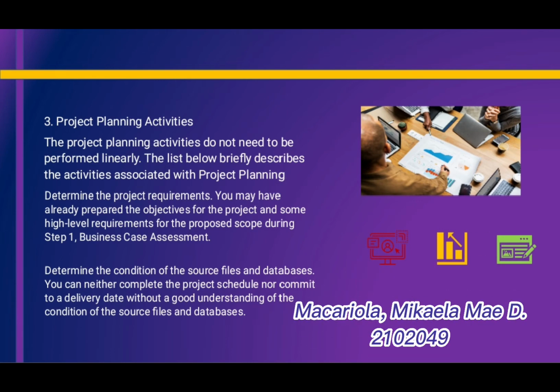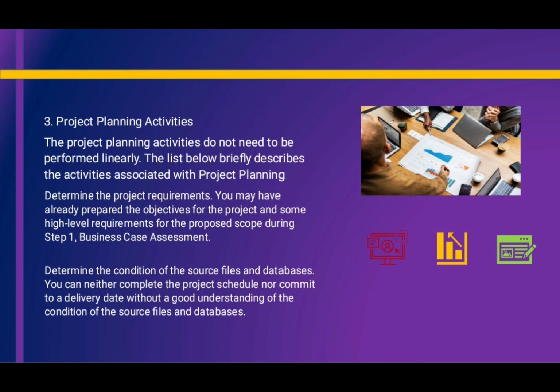Project planning activities. The project planning activities do not need to be performed linearly. The list below briefly describes the activities associated with project planning. Determine the condition of the source files and databases. You can neither complete the project schedule nor commit to a delivery date without a good understanding of the condition of the source files and databases.